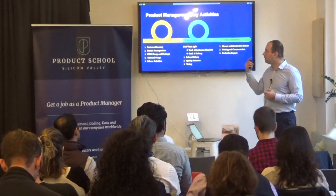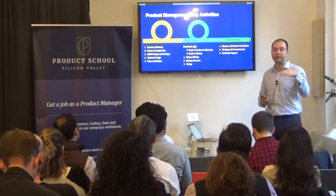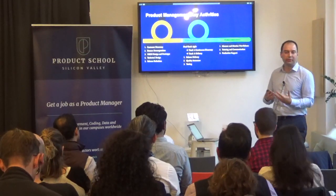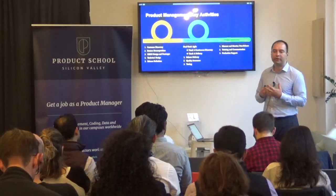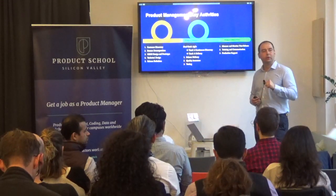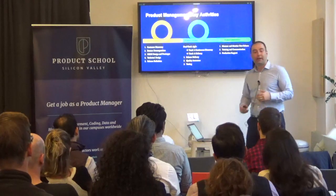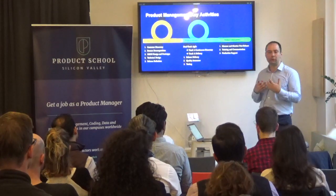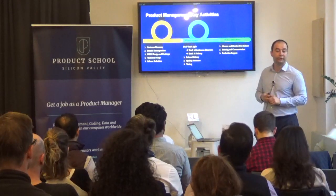Once you're done prototyping, you go to technical design. So basically, you start writing user stories. As a product manager, you should be writing user stories with acceptance criteria. Get the user stories and go with the engineering into what we call grooming sessions. You work with engineers to come up with technical tasks for each of the user stories. Based off of that, you size those user stories and come up with a release definition and a detailed product roadmap. At this point, you're coming up with a backlog of 3 to 4 iterations or sprints. It will enable you to have enough work for engineering to start working on, and at the same time, you can start working on the next batch of user stories.